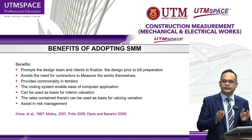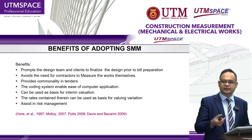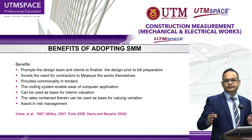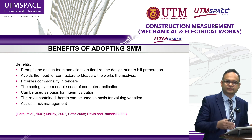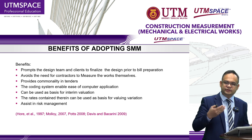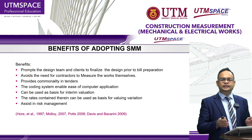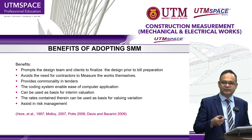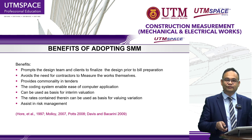The rates contained in the BQ can be used as a basis for valuing variations. During the construction stage, there are often design changes and requests from clients to change designs, spaces, or equipment — and the rates in the BQ provide the basis for valuing that work. Additionally, it helps both the consultant and contractor to assist in risk management.